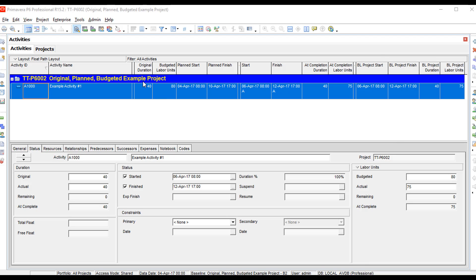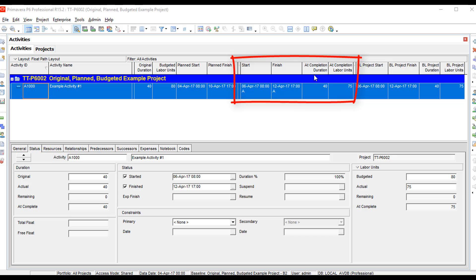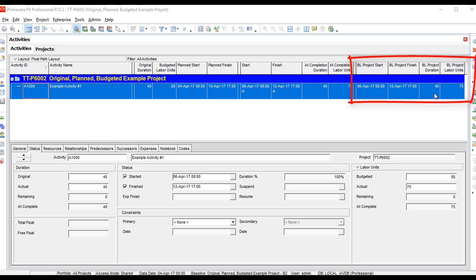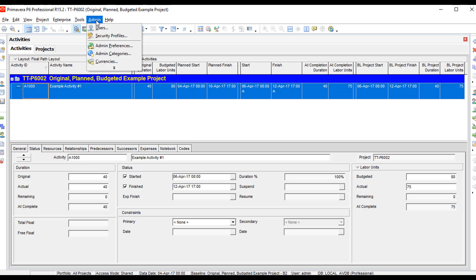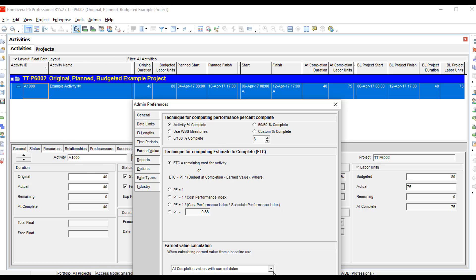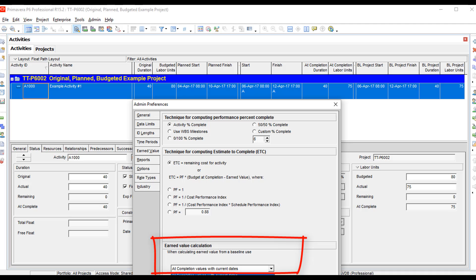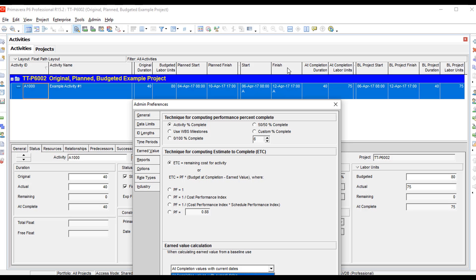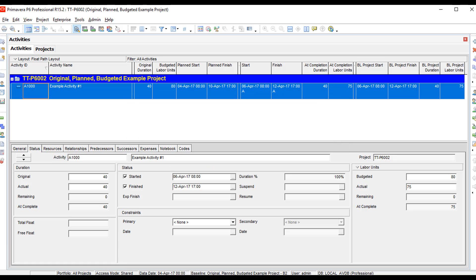To summarize: keep these fields as three different groups. Original, budgeted, and planned fields all belong in group one. Current start, current finish, at completion duration, and at completion labor units are in group two. Baseline project start, baseline project finish, baseline project duration, and baseline project labor units are in group three. When you create a baseline, go to Admin > Admin Preferences and make sure your company understands which of the three options to use, because those options tell P6 which fields to reference — whether planned and budgeted, budgeted with current dates, or all current dates plus at completion labor units.